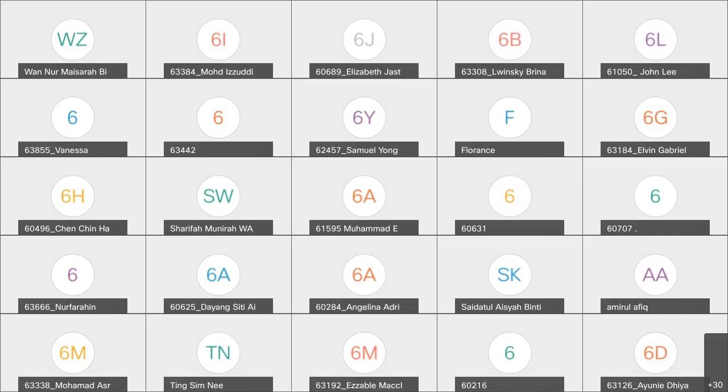And then later on, when you're doing your time section, you can actually put down first what the productivity rate is, and how you are going to arrive at which productivity rate to use. Then from there, calculate your productivity rate and put the formula in: times by, what equals to days. Get that set up first, you see, and then when you have more time, set up the Excel worksheet or tables or whatever you're doing, and do it nicely, improve on what you have done previously.